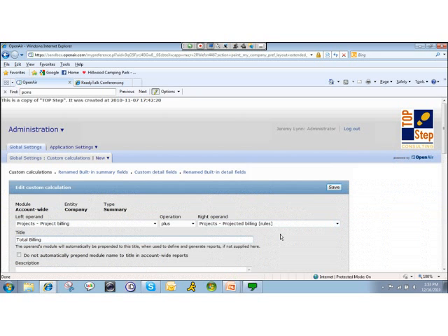Why is that important? That's where we come back to the pivot date again. When you have a pivot date in the system, December 1st, for example, anything prior to December 1st will have a value in project billing, but projected billing will be 0. There's no forecast for historical.